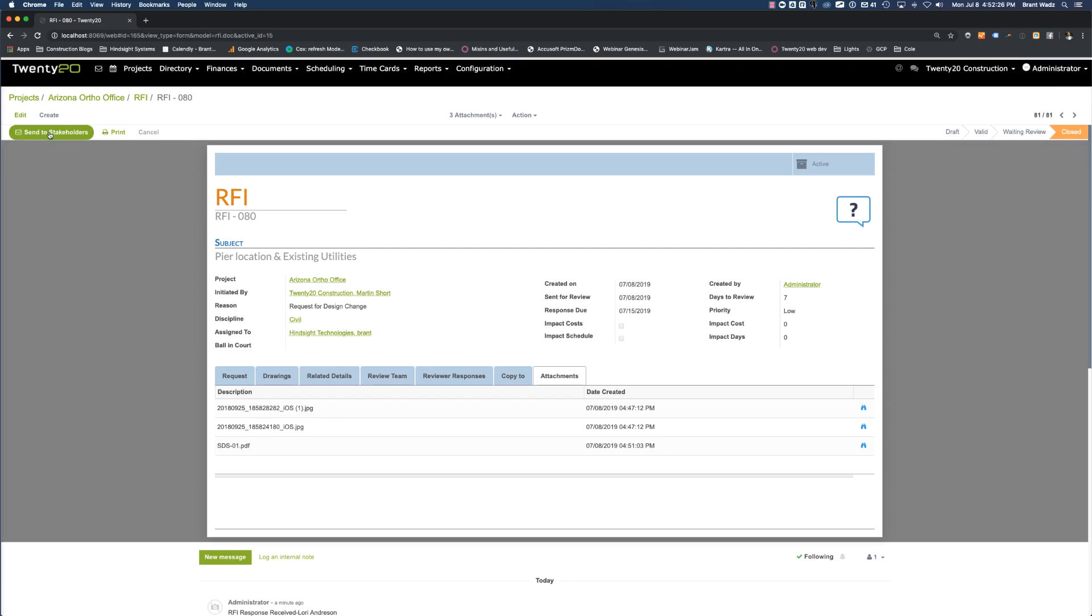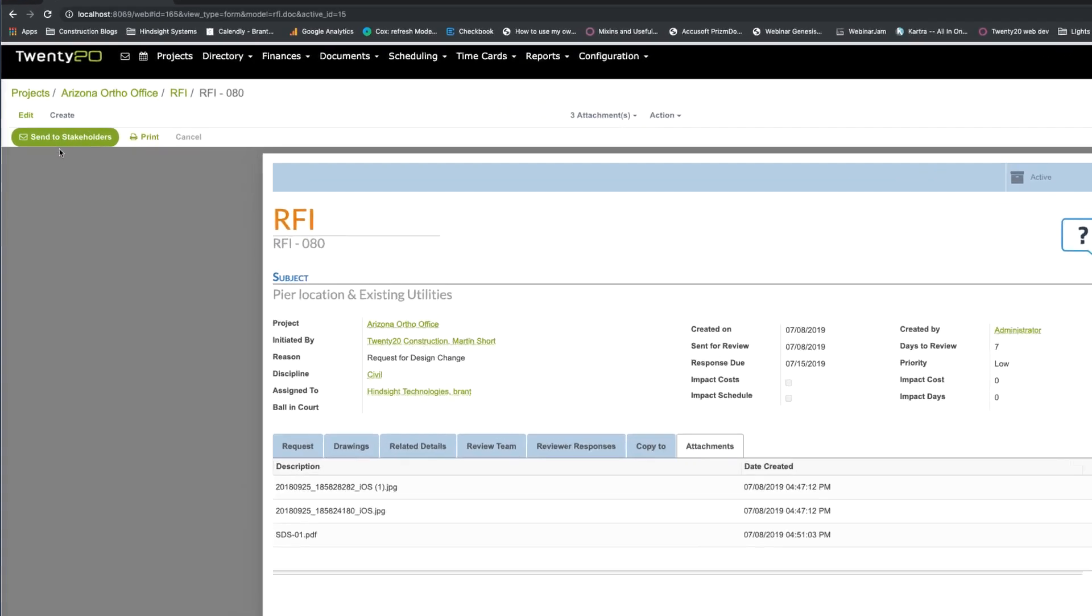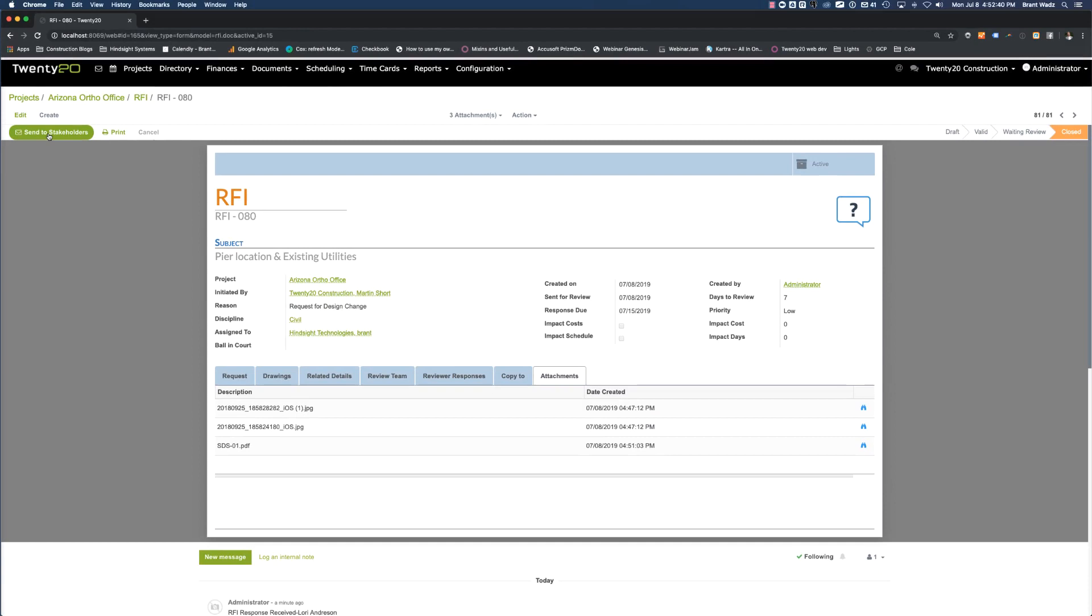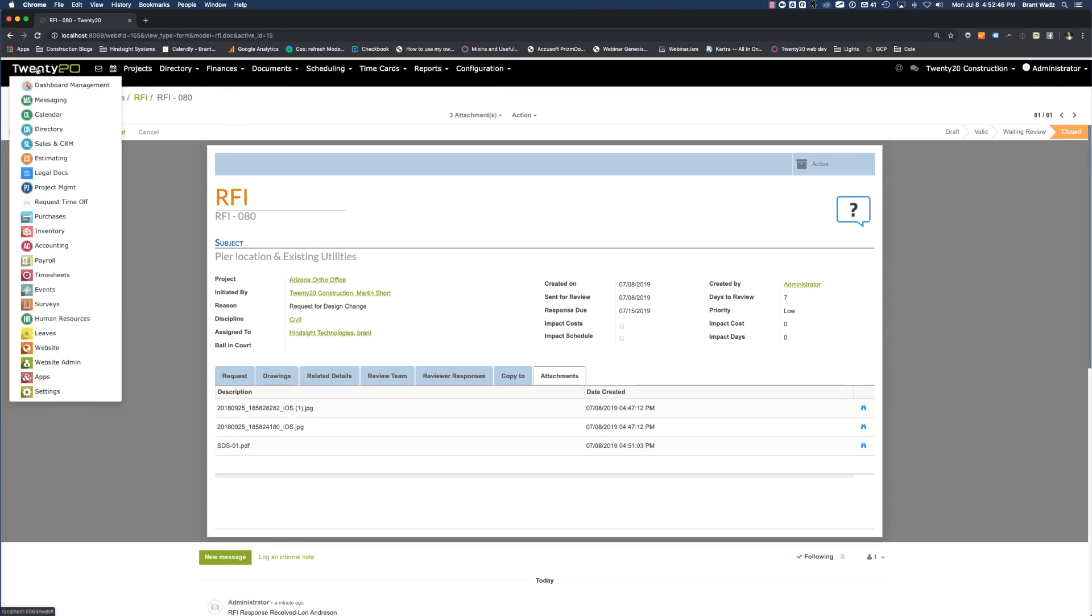Once this RFI has been closed, it may need to be distributed to the stakeholders of this project. So we simply would click send to the project stakeholders here. And it would send an email out to those individuals, those stakeholders of the project, informing them of this RFI and the response that was related. All of the stakeholders can also see all of the RFIs through the project portal. Let's show that now.